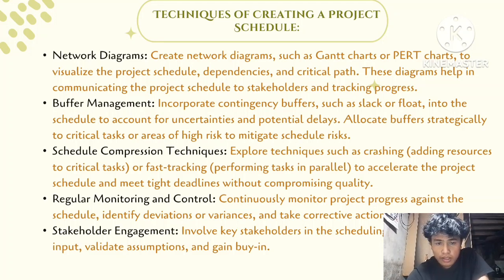Buffer management. Incorporate contingency buffers such as slack or float into the schedule to account for uncertainties and potential delays. Allocate buffers strategically to critical tasks or areas of high risk to mitigate schedule risk.